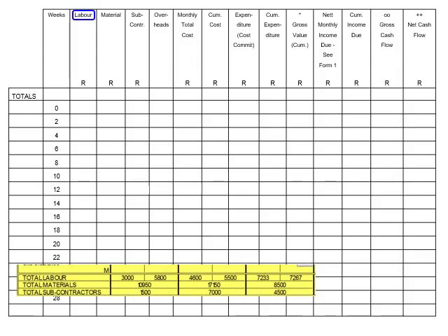First, refer to the summarized cost schedule, and find the amount recorded for labor for the first fortnight. The amount is indicated as 3,000 rand. Now, transfer this amount to the worksheet, and record it in the labor column, next to week 2. Repeat the process for the second fortnight. Refer to the summarized cost schedule, and find the amount recorded for labor for the second fortnight. The amount is indicated as 5,800 rand. Transfer this amount to the worksheet, and record it in the labor column, next to week 4.